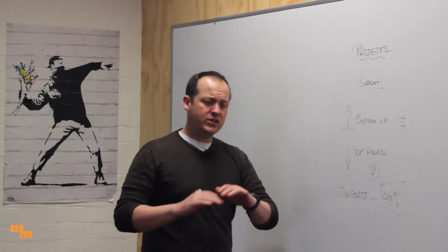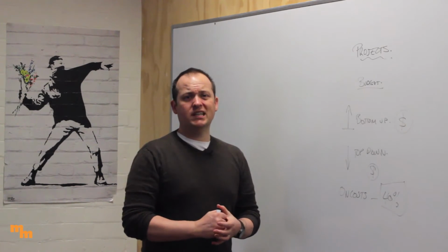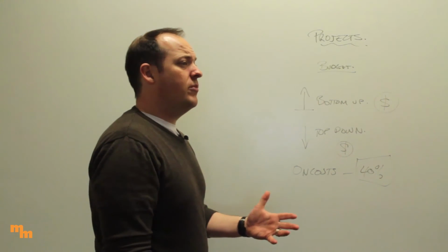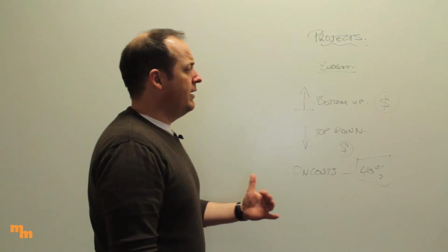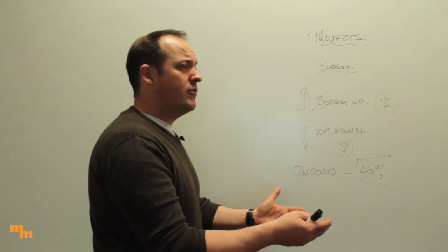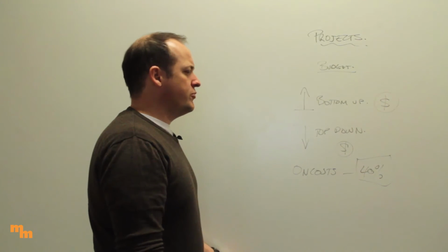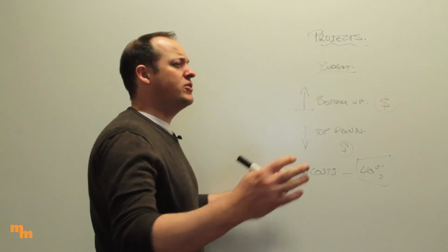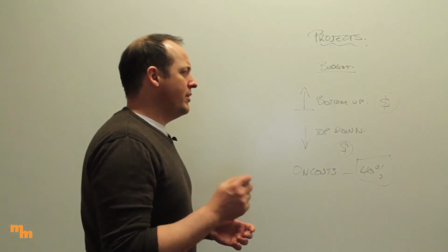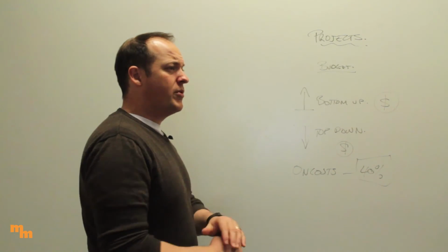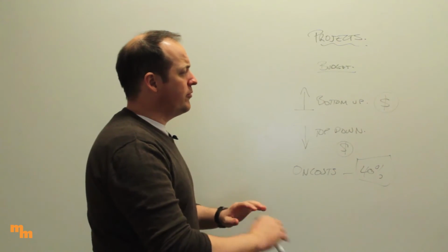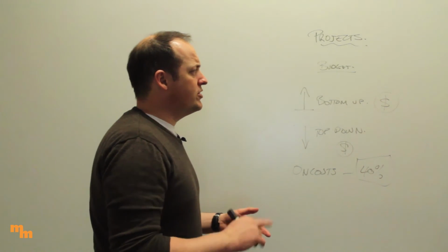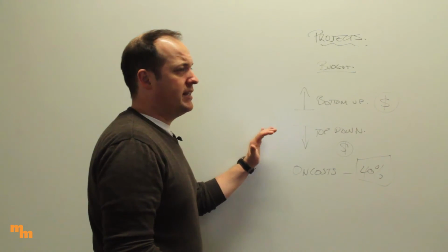Obviously when I have employees, there's a whole bunch of different costs and insurances that need to cover them as well. Okay, also if I've identified risks to my organisation, so a risk to the plan, anything I did to try and offset that risk, I need to pay for as well. So all those risks probably cost me money. And as I say, there's quite a lot of things I might need to pay for. But I need to, once again, go through my work breakdown structure and my scope, my risk management plan to identify all those things I'm going to have to buy, when I'm going to need to purchase them, how much they're going to be, and that's going to have to get factored into my budget.